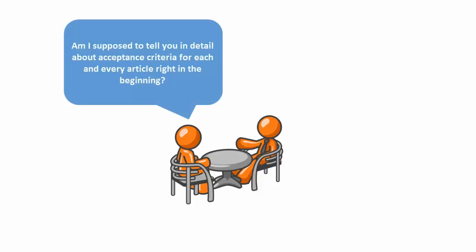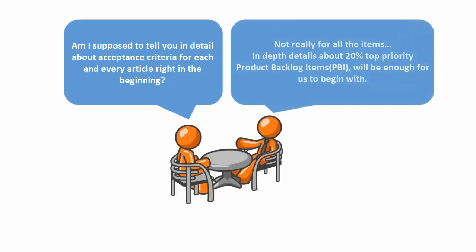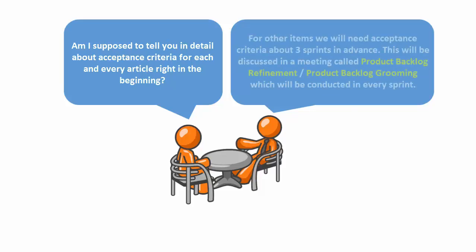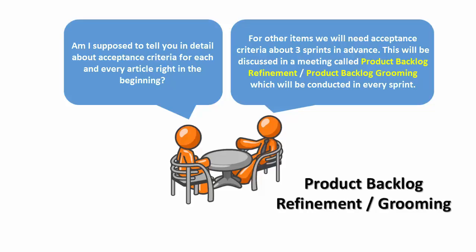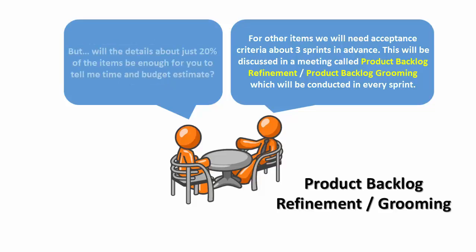Am I supposed to tell you acceptance criteria for each and every item right in the beginning? Not really for all items. In-depth detail about the top 20% priority product backlog items will be enough for us to begin with. For other items, we will need acceptance criteria about 3 sprints in advance. This will be discussed in a meeting called Product Backlog Grooming or Product Backlog Refinement, conducted in every sprint.